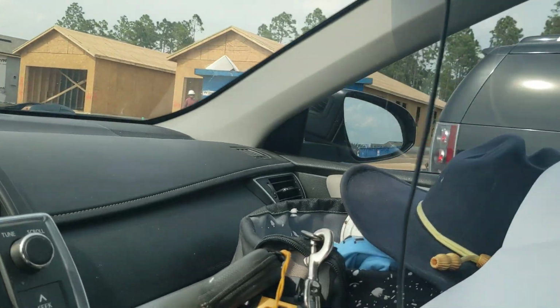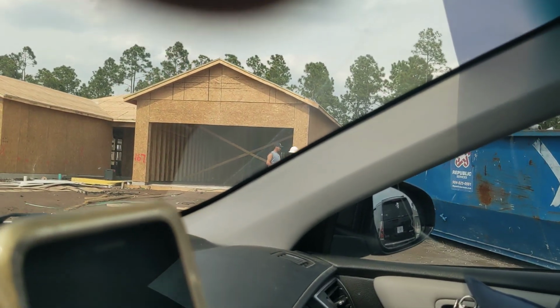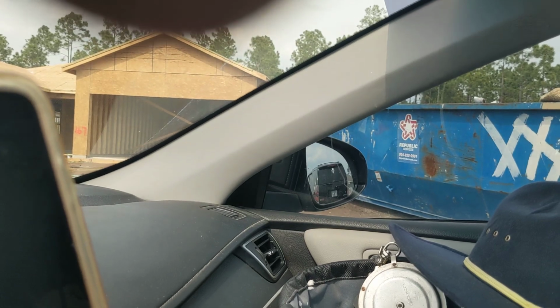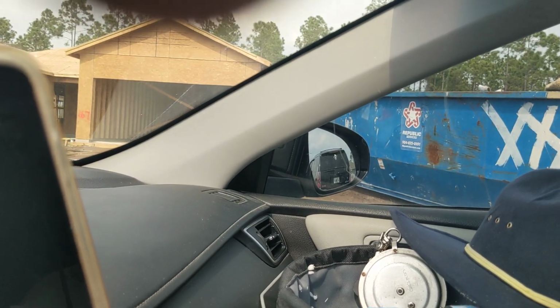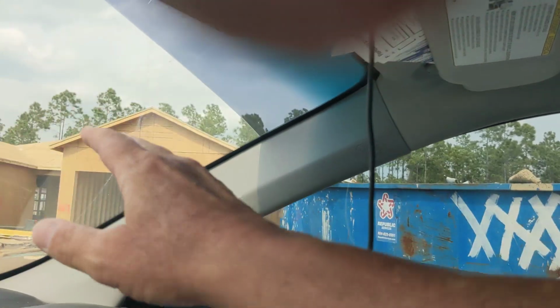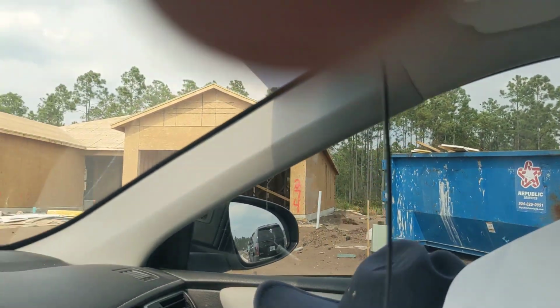Here on the right hand side, 274, 275, framers are continuing the vertical work. They got the roof decked in. Gotta talk with Jerry, the master framer there, if we're ready for the roof sheathing and wall sheathing inspections. I'd like to get those done, so that way once I'm dry, I can dry in the roof. That means I can proceed with HVAC rough.